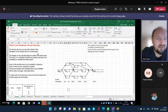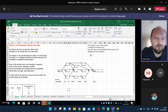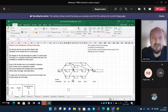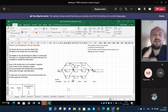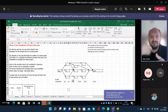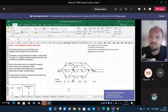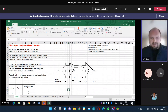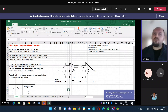We are dealing to simulate the duration of a project. Normally what we have been doing for a simple case, we were just identifying critical paths. But this time, rather than calculating it every time, we can get a proper estimation by running a Monte Carlo simulation. But as I mentioned, if we run it only once, we will get an approximate solution. If we replicate the simulations — two times, five times, ten, hundred, thousand, million times — the more we run and take mean values, it will take us much closer to the exact solution.